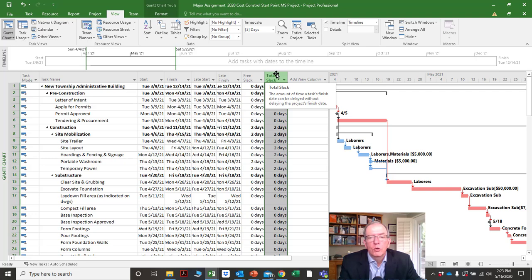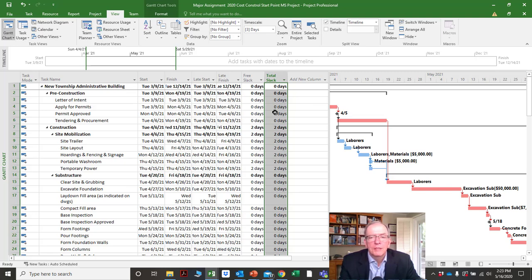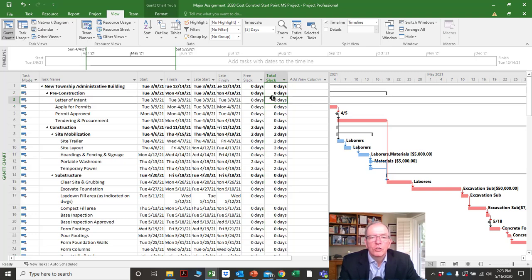You'll notice here there's total slack. In Microsoft Project, total slack is the same as total float — so if there are any Primavera users looking at this, you'll be familiar with total float. Microsoft Project calls it total slack, but they mean the same thing.